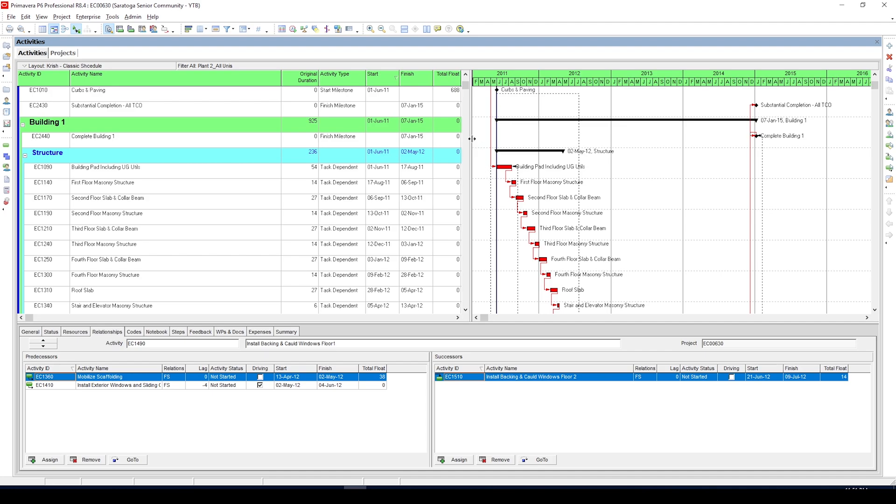First one is where you ask P6 to filter the near critical activities based on the total float. When you install P6 for the first time, P6 by default identifies critical activities as the one with total float less than or equal to zero.